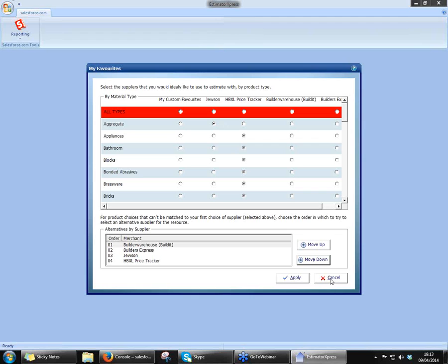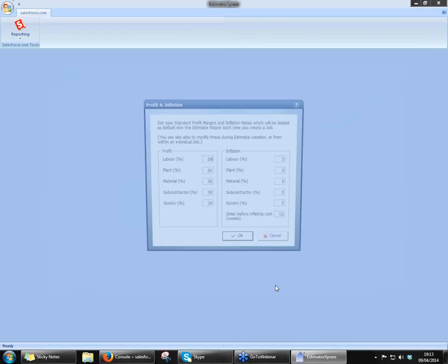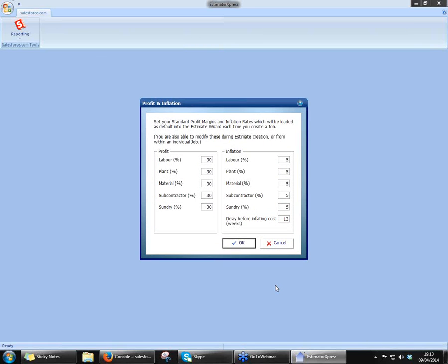I'm not going to apply that now because it does take a few minutes. Profit and Inflation. This is setting a base rate — so you're saying, in an ideal world, every job that you do, you'd like to win 30% profit across the board. Again, you can set it up for the individual job that you're estimating. We're fully aware that every job's different. You might need to set your profit up and down according to area, according to the type of client you're working for. And you can do that when you actually start working on an individual estimate.